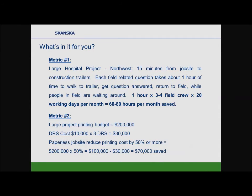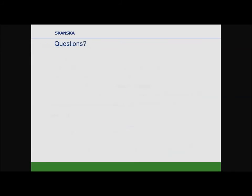The old manual process required project engineers to chase down all drawing sets and update them after every change. The newer process has one person at a computer updating documents and pushing them out to digital resource stations, iPads, Box, or an FTP site. On a large hospital project in the northwest, the job site was 15 minutes from the construction trailers — that round trip easily cost an hour or two per worker. The printing cost on that project was $200,000. The digital resource stations cost around $10,000 each; with three stations at $30,000 total, we saved at least $70,000 on that job.